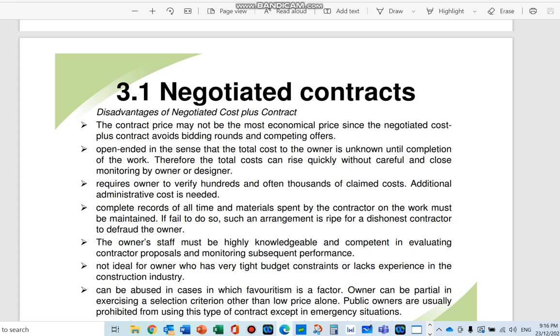We cannot just simply talk about contract type without making you think about the contractual documents. And one of the most important documents will be the agreement itself, whereby we state down all the rights and obligations, the risk sharing, and the procedures of doing things contractually, like applying for claims, what do we do step by step, extension of time, what do we do step by step.